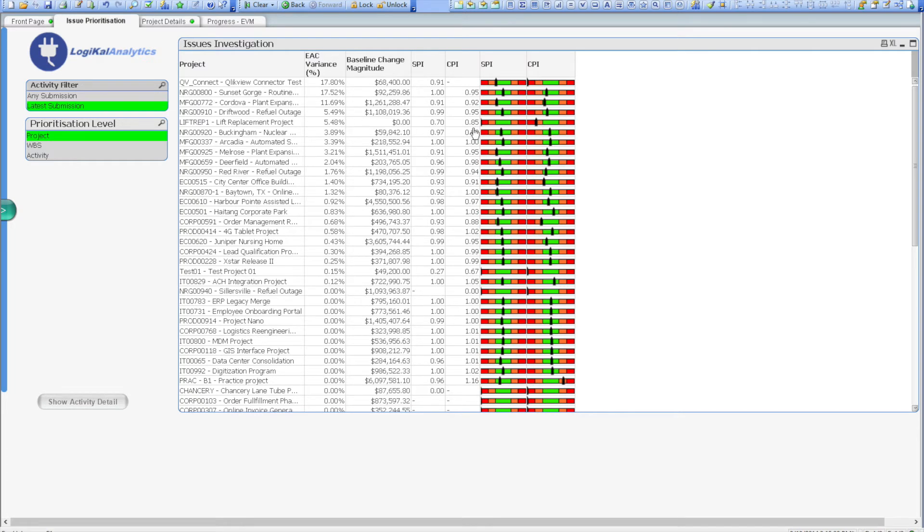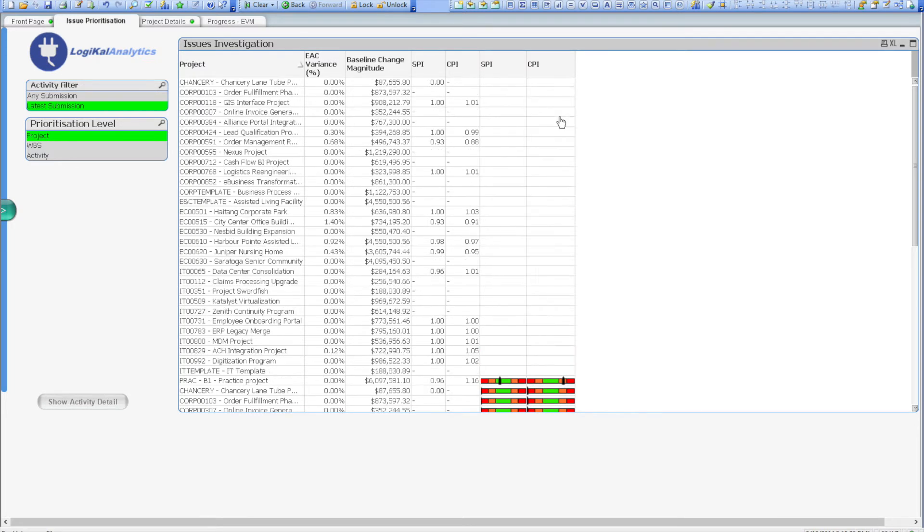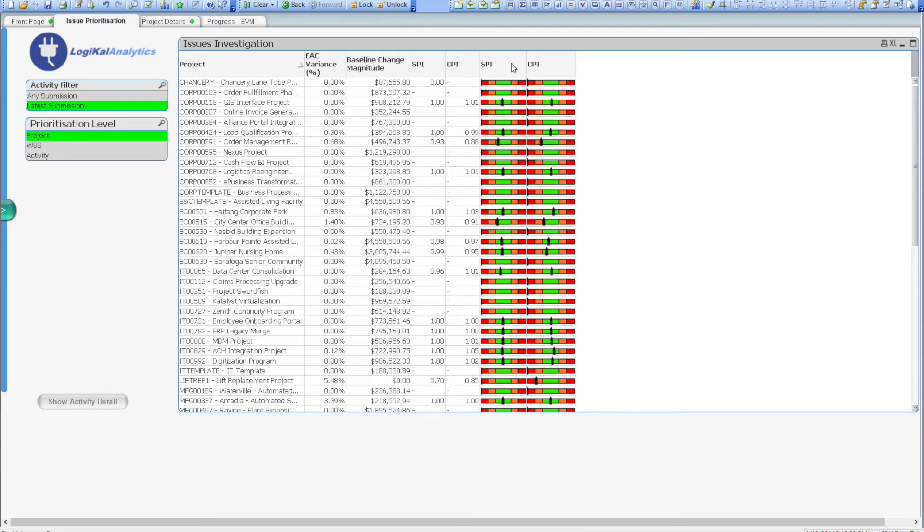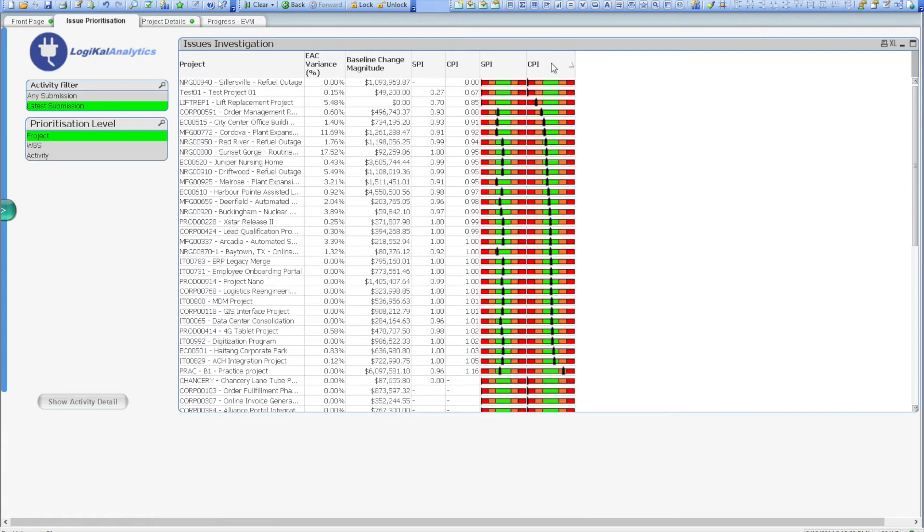As you can see, the projects are being displayed in alphabetical sort order for the moment. However, I want to rank projects based on performance issues. First up, let's see which projects have cost issues. Double-clicking on the CPI column will instantly rank from worst to best all of the projects I can currently see.